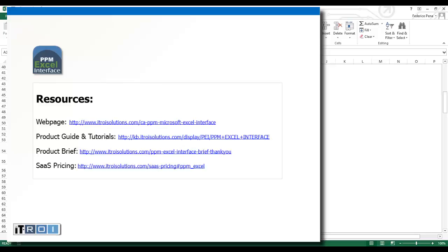That was for allocations. And cost plans. Can you add time periods for cost plans? As I mentioned before, you can't, because the way cost plans are configured, once a cost plan has been defined, your time periods have been defined already. It's not something where you can just add rows, because as I mentioned before, we pivot that data. So you can do it, but not in the interface that I displayed.